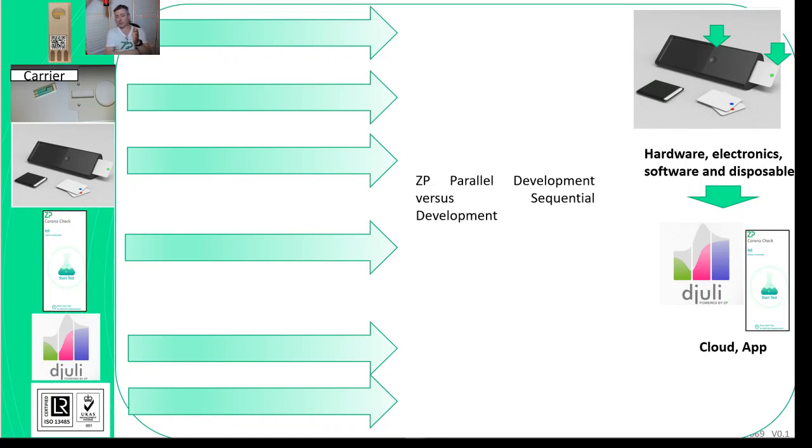Now, you might do some heavy lifting on the sensor work early on and push off your quality system, but actually they run in parallel throughout the entire development. There is an end point to this, which is you have to release products that are locked down enough to do the clinical assessment on, but don't necessarily run sequential efforts. I'd actually run parallel efforts, and that's the way we do things at Zimmer & Peacock.